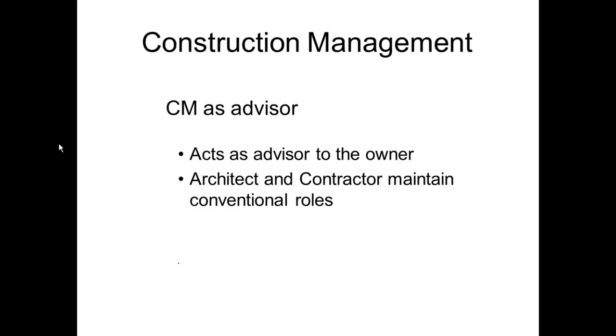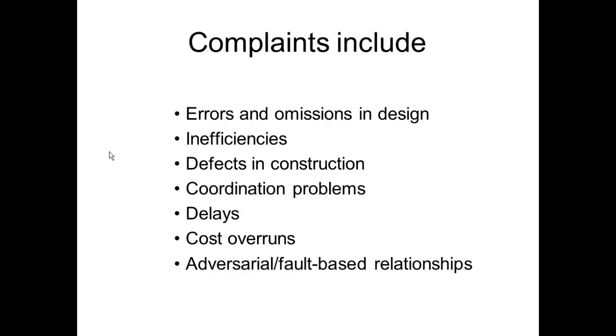There is the CM as an advisor, and this is basically a construction manager that gets hired by the owner to watch out for the architect and the contractor, to be in the best interest. So if you're doing a design build, you could maybe even add a CM as an advisor to come in and work outside the architect and contractor in your benefit to make sure things are working well.